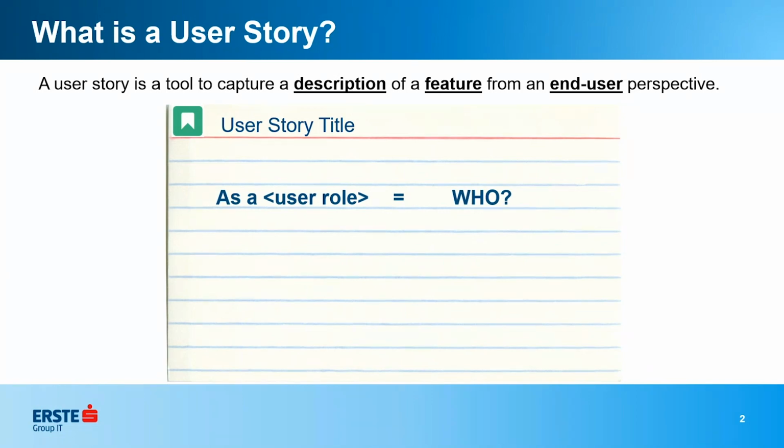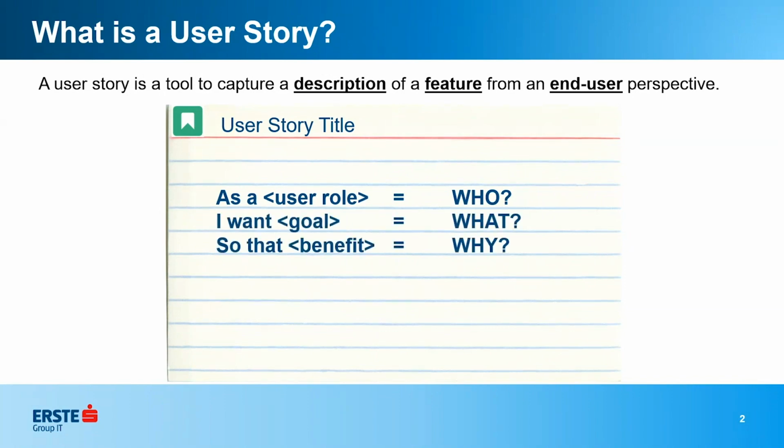And you want the who. This is one example of how user stories are written, because it's easy not to forget the different aspects of a good user story. So the who, what, and why, you can write it however you want. You can say, as a user of this app, I want to be able to pay my balance so that I don't get any late fees. That's just one way to do it.